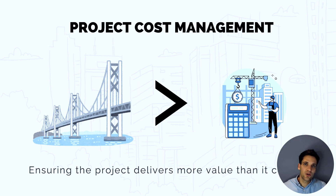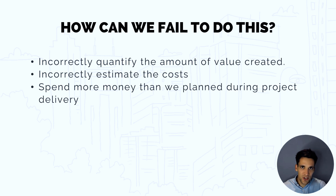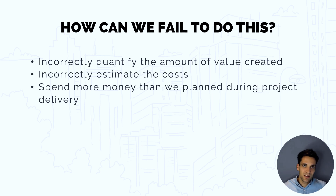So that's the goal of project cost management: to ensure the value delivered by the project is greater than the cost of delivering it. When learning a new concept, it can be helpful to reverse engineer it — rather than thinking about what it's trying to do, think about what you'd have to do to fail. So how can we fail to deliver more value than it costs? Well, we can incorrectly quantify the amount of value we're going to create — for example, during a feasibility study, we might overestimate how much value the project will create.